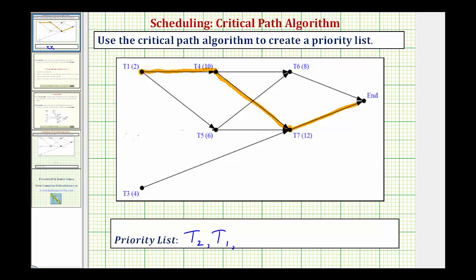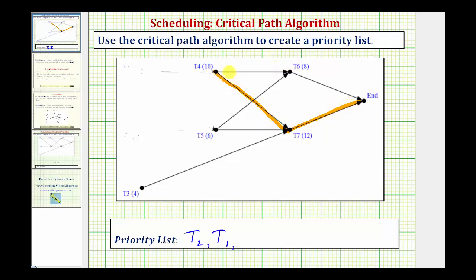Now we eliminate task one from the digraph and repeat. We're looking for the longest path. If we go from task four to task six to the end, that would be 18 hours. But if we go from task four to task seven to the end, that would be 22 hours. Starting at task five, from task five to task seven to the end is only six plus 12, or 18 hours. And from task five to task six to the end is only six plus eight, or 14 hours. So the critical path takes ten plus 12, or 22 hours, and therefore task four is next in our priority list.